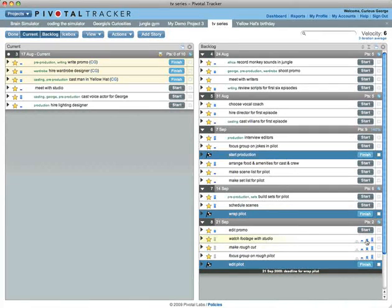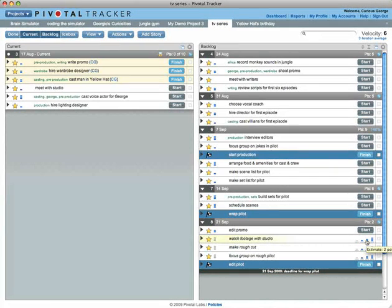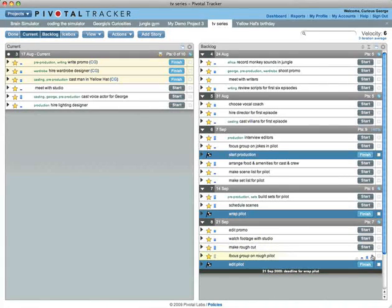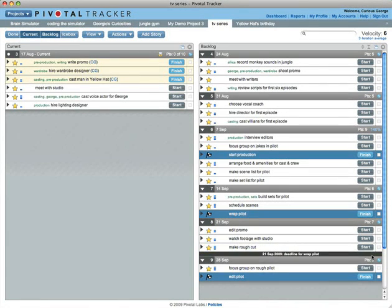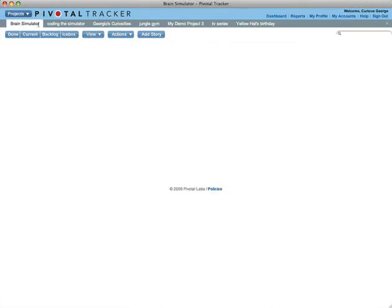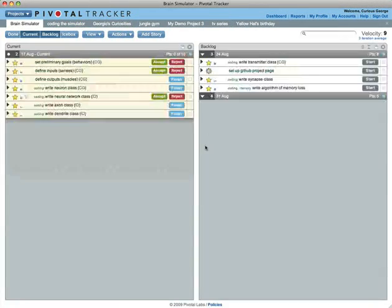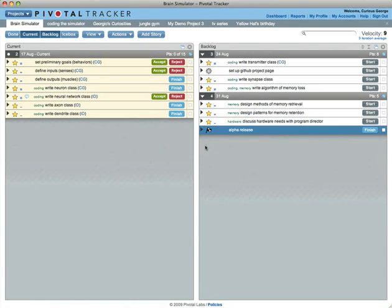Unestimated stories count as zero points. When you estimate them, your iteration boundaries will move.